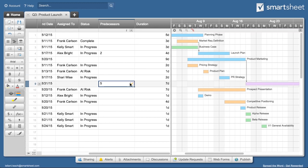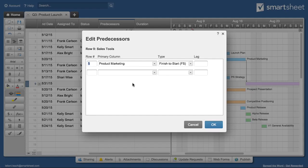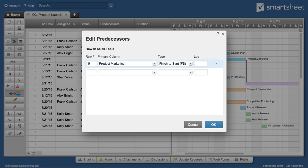To edit predecessors, click on the small pencil icon. Here you can change the number of lag days or hours and also change dependency types. For example, you can modify a dependent task to start at the same time as its predecessor.